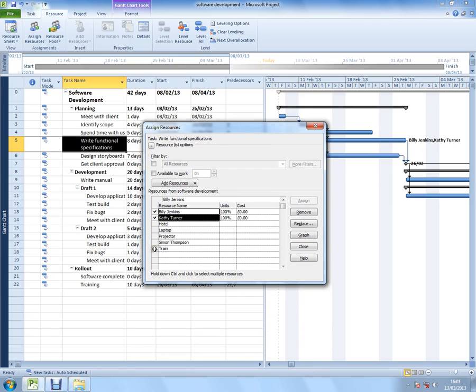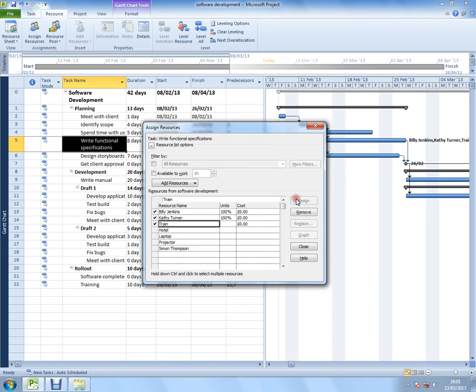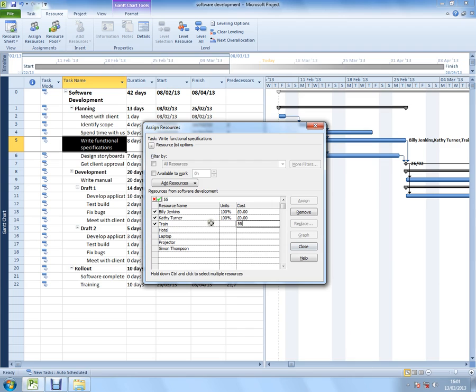I'm just going to add a cost resource. I'm going to select train and assign train. It's okay that I assign it after because it's a cost resource. This message at the bottom does not apply. And I can add maybe £55 worth of train costs used there in that cost resource.